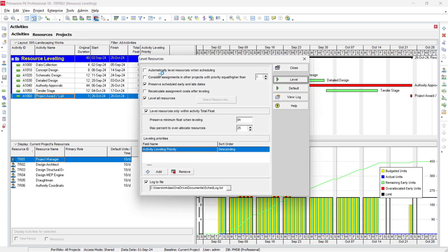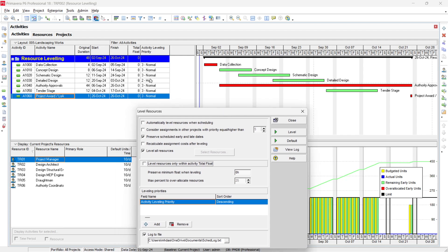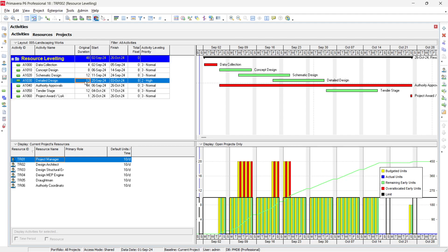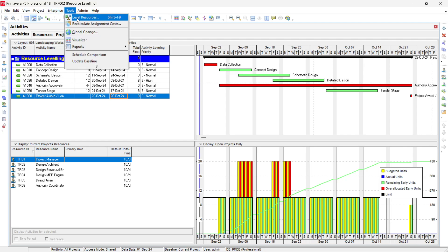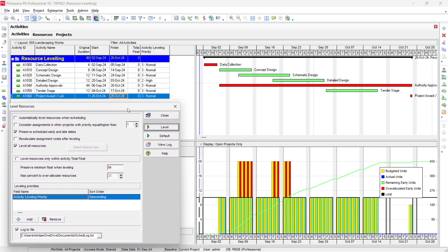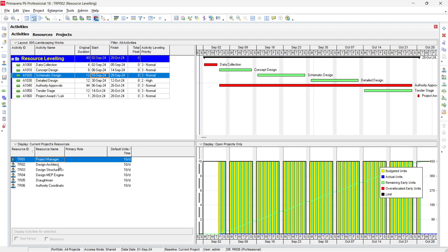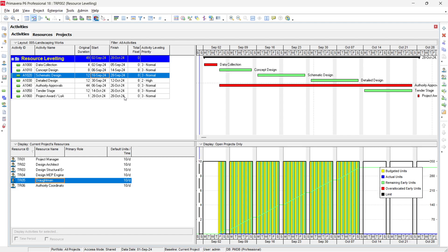Select Level Resources. We discussed all the options earlier. Since our activities have 8 days total float, we run it without the float constraint first — press F9 to schedule, confirming project completion is 26 October. Then go to Tools, Level Resources, and click Level. You can see that Schematic Design now starts from 16 September instead of 11 September, and all resources are now leveled.